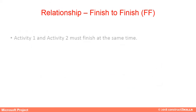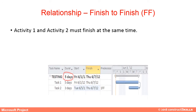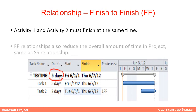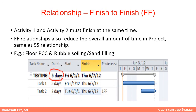Finish to Finish: Activity 1 and Activity 2 must finish at the same time. These relationships also reduce the overall amount of time in the project. An example is the relationship between floor PCC and rubble soiling.